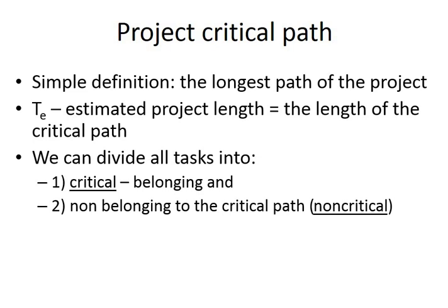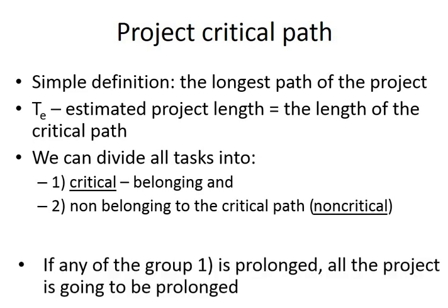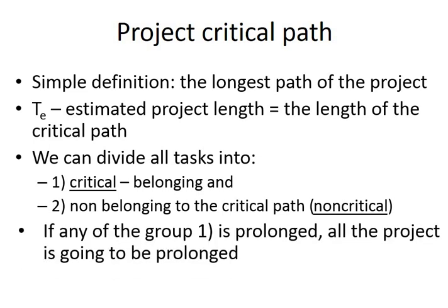So we can divide all the tasks into critical and non-critical. The critical ones belong to the critical path, which is self-defined. The thing is that if any of the critical tasks is delayed, then the total project is going to be delayed. If, on the other hand, any other task is delayed, then not necessarily does the project need to be delayed.